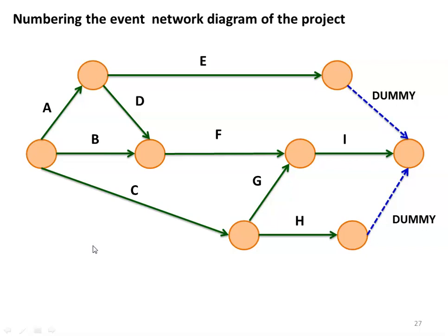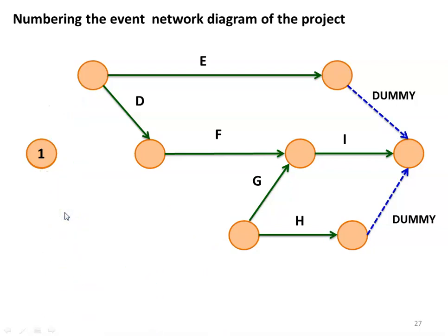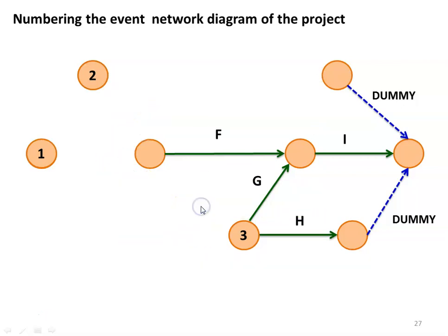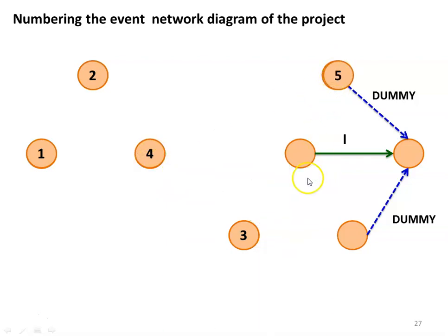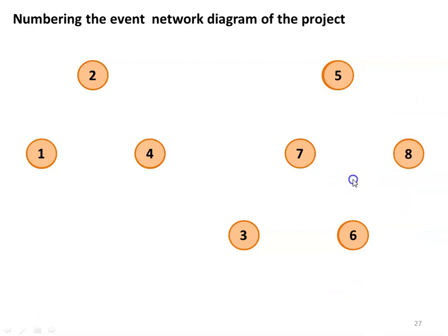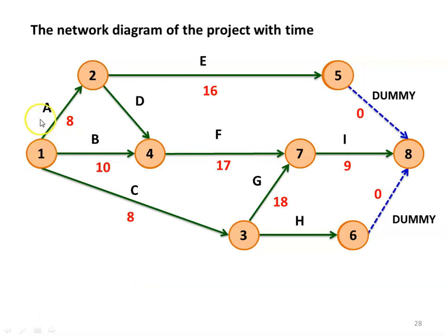Now we number all the events. The first event is taken as 1. Deleting activities emerging from the first event, this becomes event 2, this becomes event 3. Next we drop activities D and E; this becomes event 4 and this becomes event 5, then 6 and 7, and finally event 8. So there are 8 events in total. The activities A, B, C, D up to I have times: 8, 10, 8, 16, 17, 18, 9 days respectively, and the dummy activities consume 0 days.